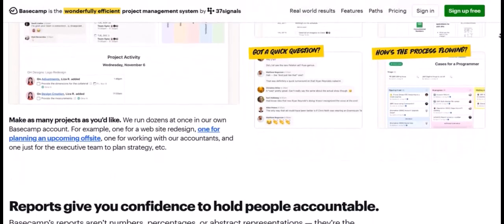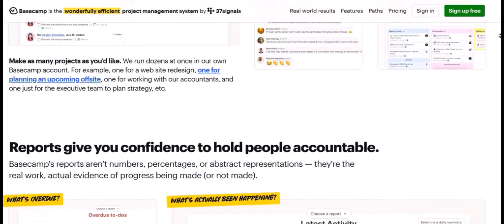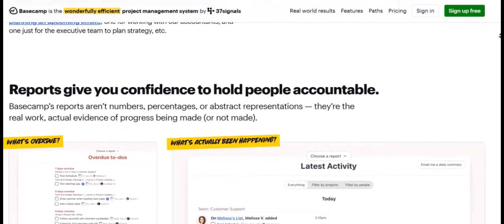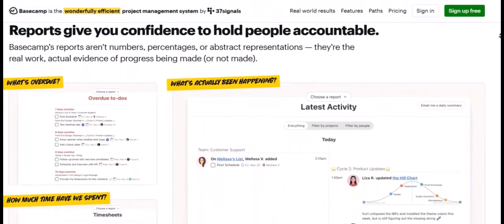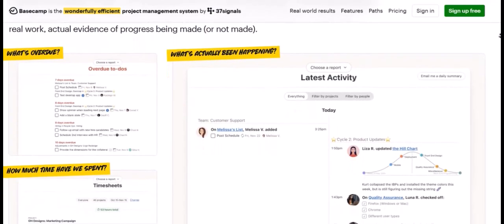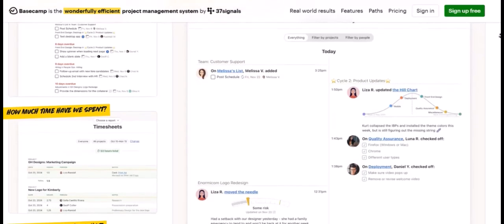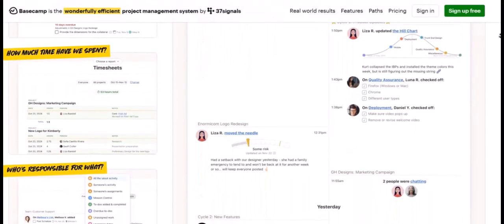Message board topics. Draft initial messages or standard discussion topics. Schedule items. Add recurring meetings or key milestones, again using relative dates. Docs and files. Set up a folder structure or include any standard documents, e.g., project charter template, brief template. Check-ins. Set up regular check-in questions.